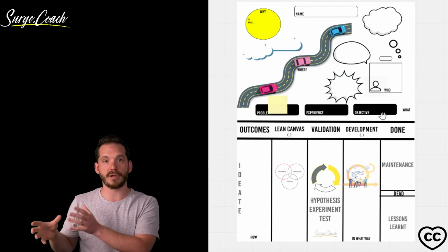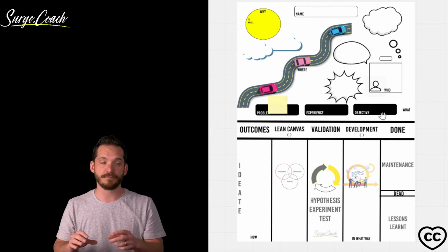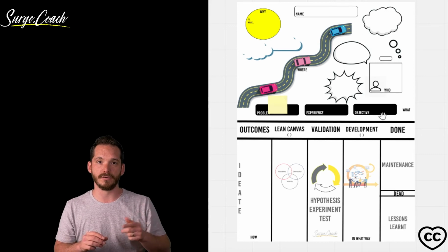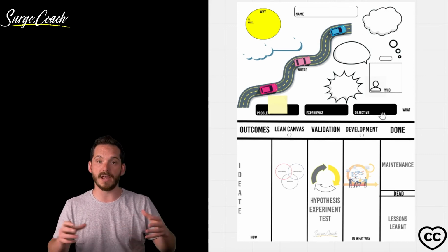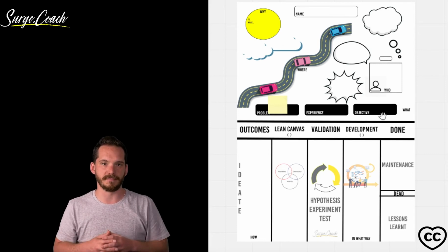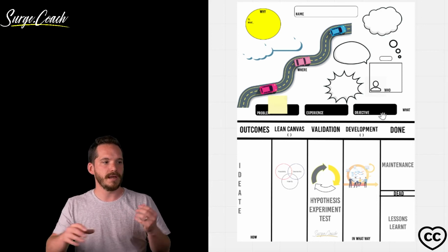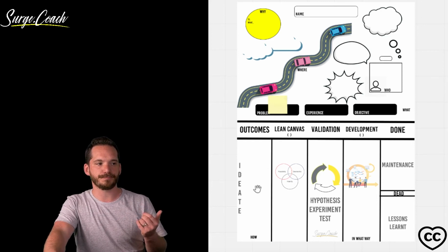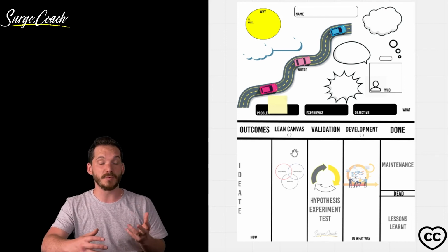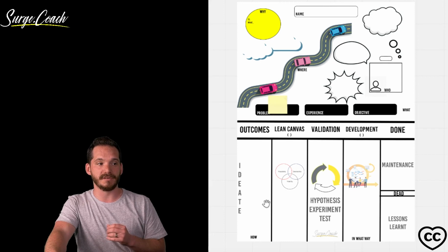If you're not using the Google OKR model and you're just using objectives, SMART goals, and they're a little bit more low level, you could have 3 or 4 of these depending on all your projects. And then you get everyone together and you ideate to find solutions for that objective. Again, you may have something in mind, and that's totally fine. Then the outcomes become features. The features could have lean canvases. A feature in this case would probably be about 90 days, roughly, of work, because that way you could do 90-day planning for the entirety of this.